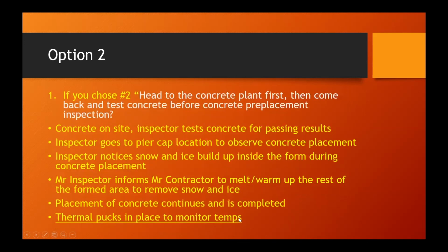So if you chose option number 2 as the inspector, again, one of your duties is to go to the concrete plant, sign the first ticket, verify weights at the plant. Then you have to beat the concrete truck back to the construction site to inspect and test the concrete for passing results before placement.